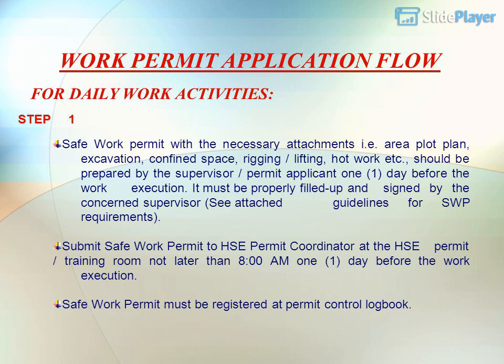Submit safe work permit to the HSE permit coordinator at the HSE permit training room not later than 8 a.m., 1 day before the work execution. Safe work permit must be registered at the Permit Control Logbook.